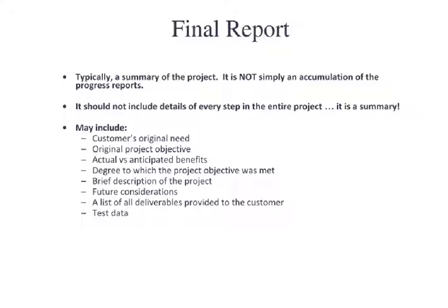A list of all deliverables that are going to the customer, so what is actually being turned over to the customer, and then data. It could be material test data, performance test data, software validation data, you name it, all types of data. If the data was taken, the customer is going to want that data in order to be able to learn from it for future projects, so it needs to be included, typically in an appendix, not in the main body of the report.